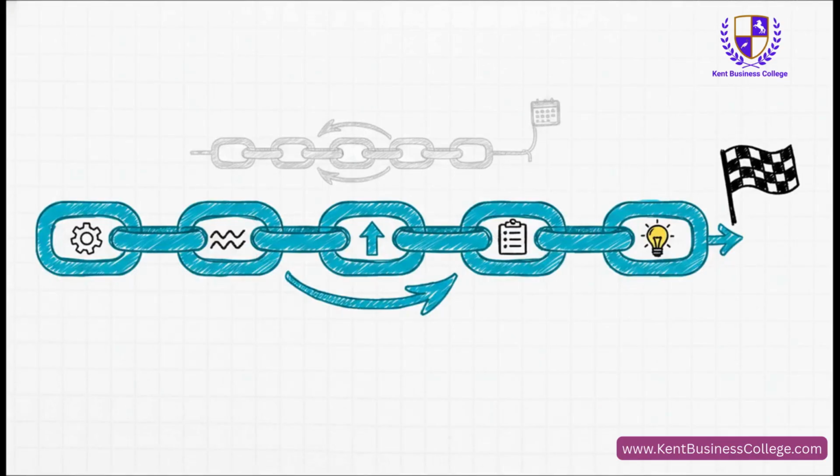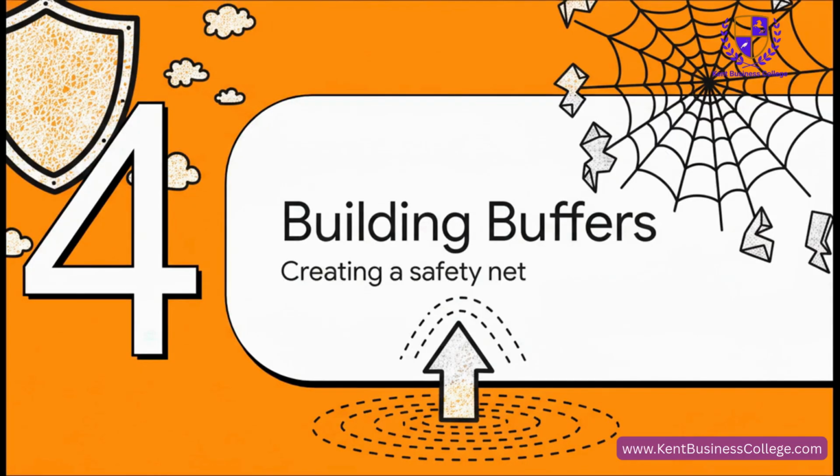And what we've just uncovered, that sequence, that's it. That's our critical chain. It's the longest path through the project, but, and this is key, it also accounts for those resource queues. So for us, it's A, then C, then B, then D, then F. All done in 20 aggressive days. Brilliant. We've got our super efficient, lean, mean project plan.